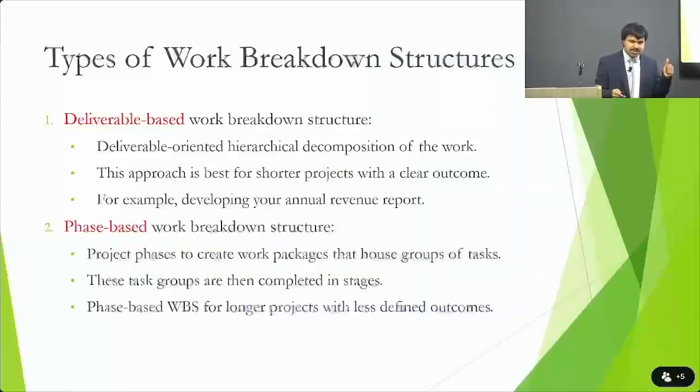Right. Work breakdown structures, conceptually there are two different types. One is the deliverable-based work breakdown structure. The other one is the phase-based work breakdown structure. Deliverable-based is predominantly used for reports and smaller scale projects. And then phase-based is for the larger projects. At Caltrans, our delivery system is based on the phase-based work breakdown structure. So that means you break the project into several phases, and then you manage each phase by phase as you make progress on your project.